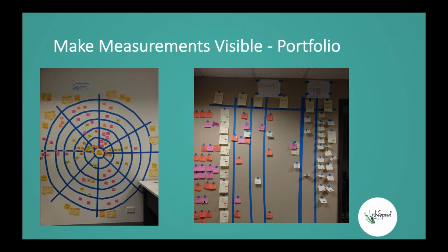And so that's work that would happen outside of PI planning, before. The way SAFe works is that we have our business product managers and business executives come into PI planning giving the goals and priorities for the next PI. So the question is, how do they determine what those goals and priorities are? Well, the SAFe recommendation is to use weighted shortest job first, that they would have those discussions before they come into PI planning as a way to determine what the features and goals of the upcoming PI should be.